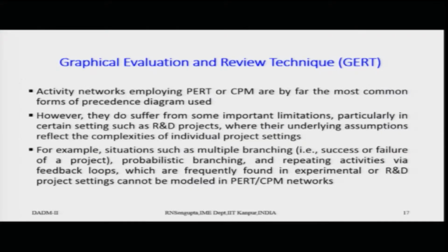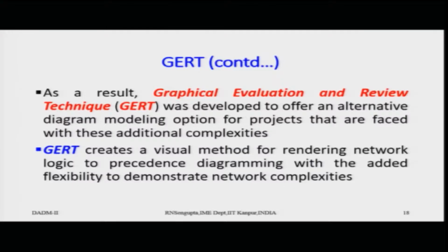So, the probabilistic branching and repeating activities via the feedback loops, which are frequently found in experiments or R&D projects, cannot be taken into consideration when you are doing the project evaluation review technique or the CPM method. As a result, graphical evaluation and review technique, GERT, can be employed to offer an alternative diagram modeling option for projects that are faced with these additional complexities.